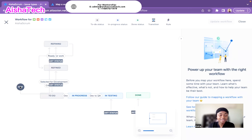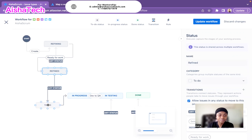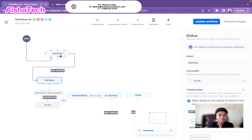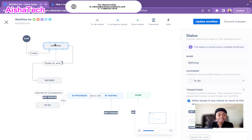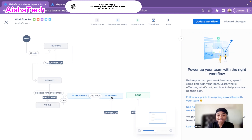Now let's look at the workflow. This is our current flow: when we create a ticket, it goes into Refining — which we're calling 'ready for work' — then to Refined, which is 'selected for development,' then to to-do, and follows through in-progress, dev to QA, in testing, and done. It also allows the transition from in-testing to approval and beyond.